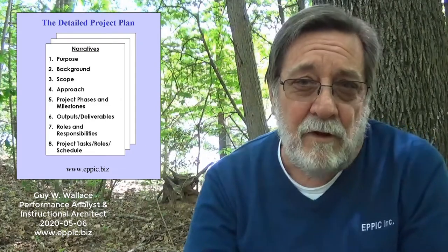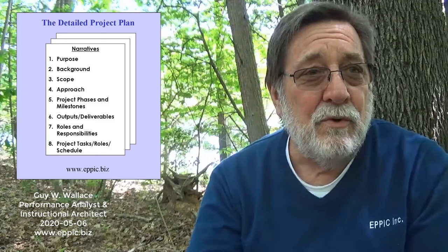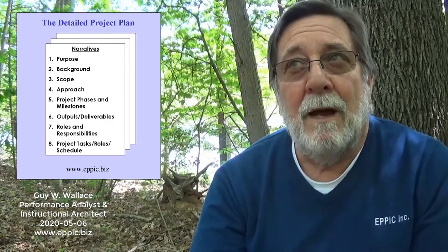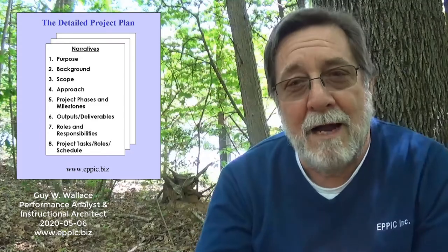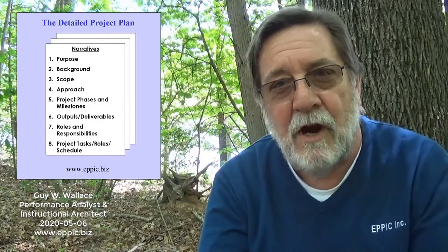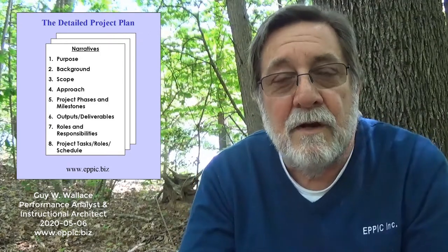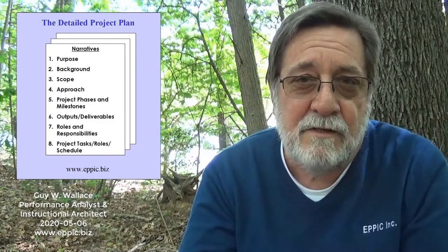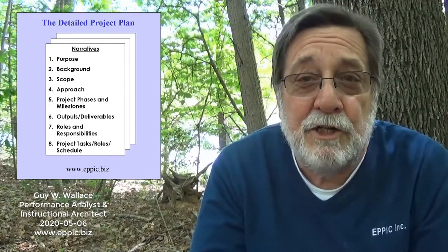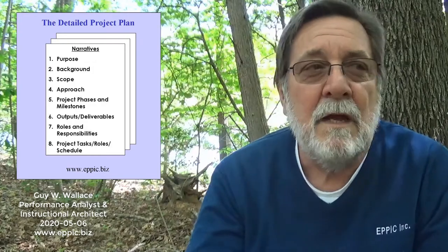But what I've done with my ADDIE level MCD, Modular Curriculum Development / Acquisition, my equivalency to an ADDIE kind of an approach to building content, was that if I wasn't able to plan and estimate with great assurity on my part, then I would fix fee the project's first three phases and give at the beginning, before anything started, an estimate for the final three phases. Now, my phases for MCD, the first one is project planning and kickoff, followed by phase two analysis, followed by phase three design. I'd always felt that I could reasonably estimate my touch time, which then reflects my internal cost for conducting the project, therefore affecting the price to the client, that I would need to